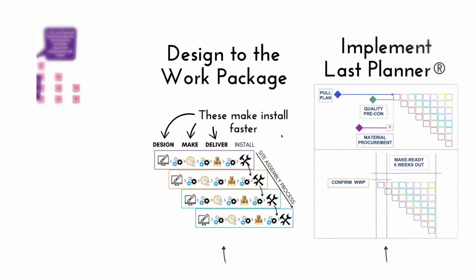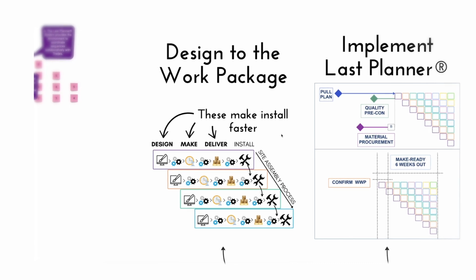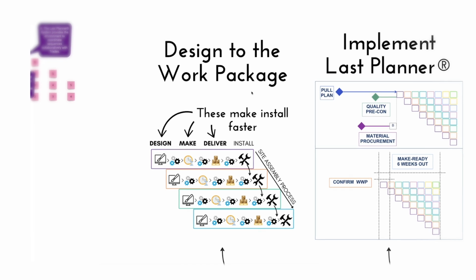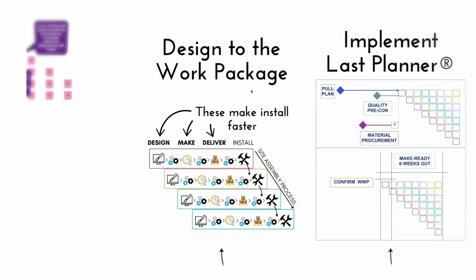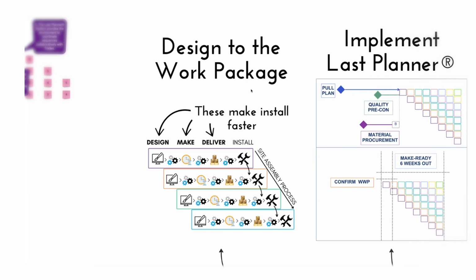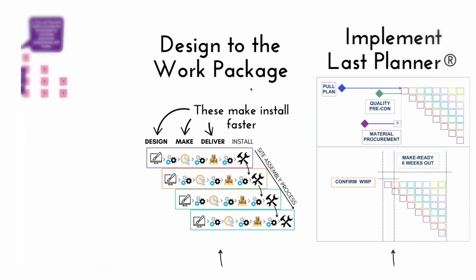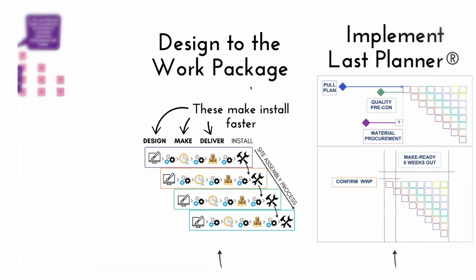And one of the things that I love about the Takt Production System is that when you find bottlenecks, you have a couple of options, or problems, you have options. So you've probably heard about advanced work packaging. There's a lot to advanced work packaging, including breaking out these large functional areas, finding the path of construction, using building information modeling, organizing things as work packages, preparing the crew, and having specialists create the installation work packages.